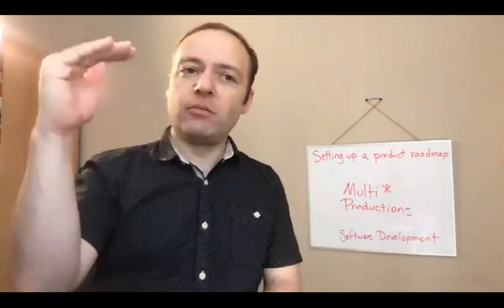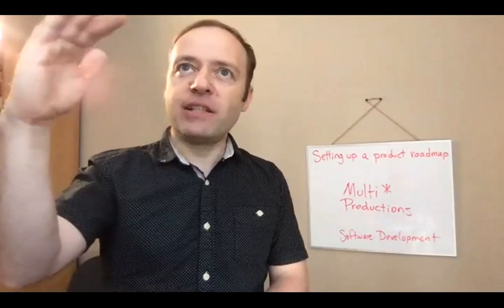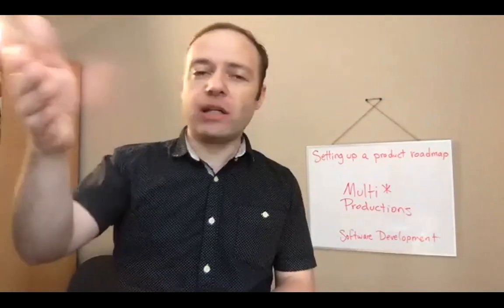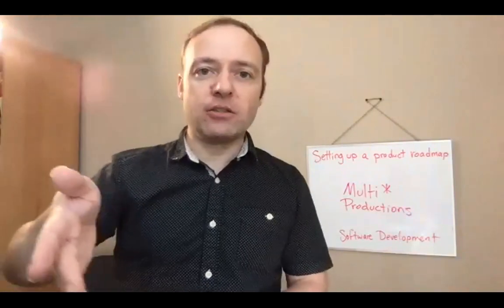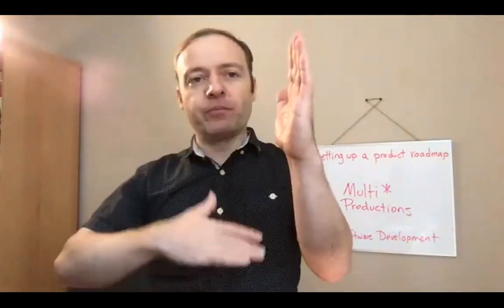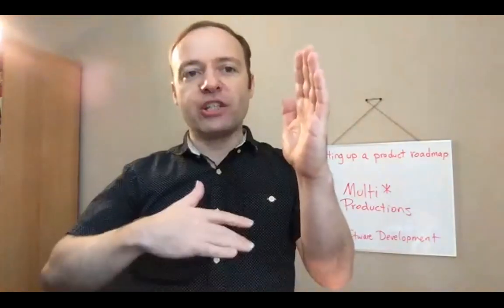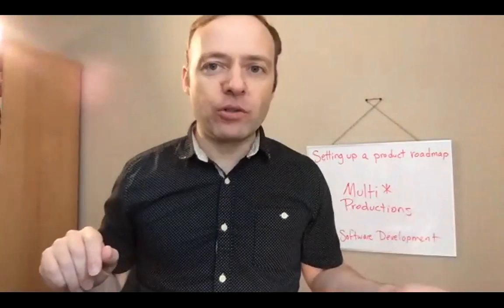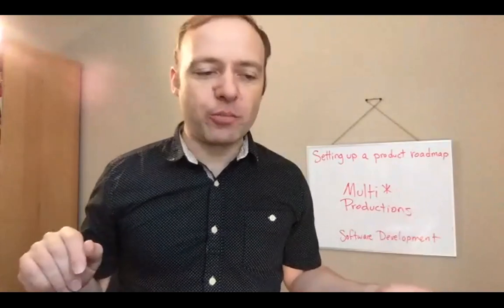In a waterfall project, we will estimate how much time it will take, and then we will do a quote and say, okay, we're going to charge you $100,000 for your website, for example. And then the client is going to say yes or no to this detailed analysis of the project to build. But with agile, we are just going to say, we're charging you, I don't know, 100 hours per sprint or 400 hours per sprint.